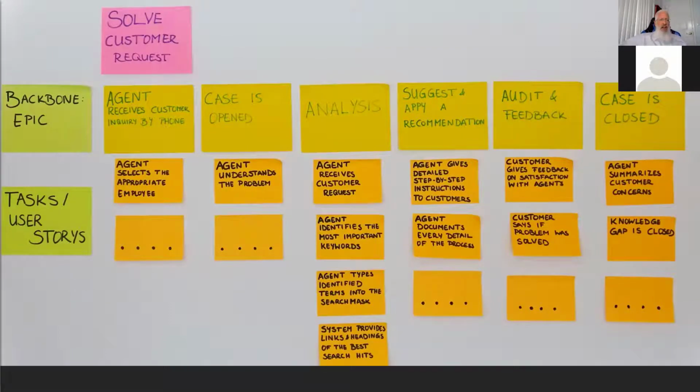Real simply, a user story map has a backbone, and they're called ribs. So the backbone are the epic ideas or the process flow, and then the ribs are the different tasks that are necessary to be performed in order to create this epic capability or this epic action or this epic step in the process.